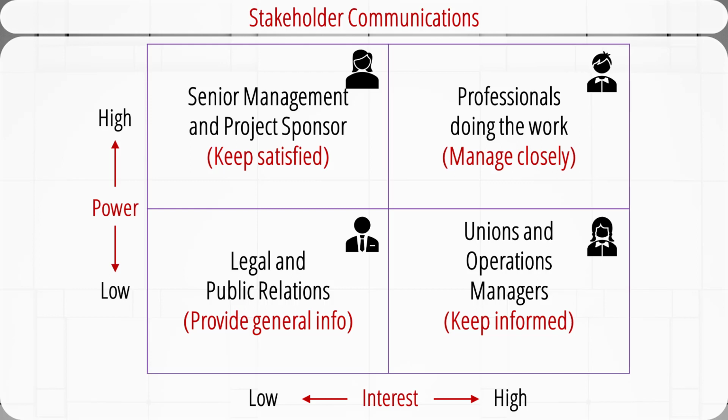For example, top management needs to know how the project is progressing, whether it's encountering critical problems, and the extent to which project goals are being realized. This information is required so they can make strategic decisions and manage the portfolio of projects. Project team members need to see schedules, task lists, specifications, and the like, so they know what needs to be done next. External groups like suppliers need to know any changes in the schedule and performance requirements of the components they are providing.